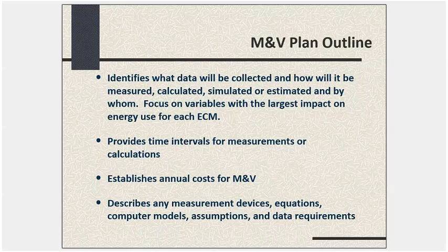Because shockingly, sometimes you'll find you have an M&V plan that's well defined and it requires certain data, but that data has to come from an electronic control system of some kind, and sometimes that electronic data can disappear or go missing or be corrupted, or there can be a failure, and then you're missing data that you need for purposes of doing the M&V plan, in which case you'll have to come up with a second alternative approach of some kind.